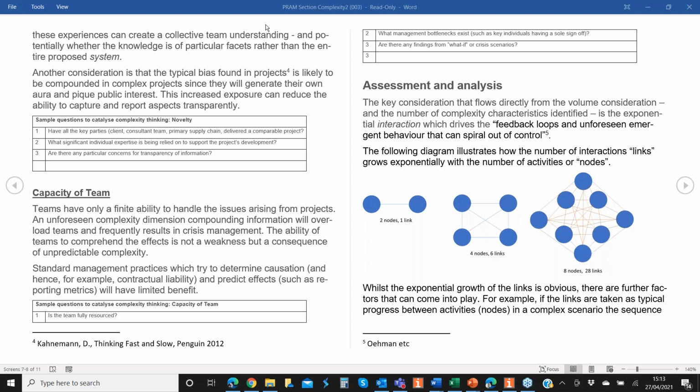Speaking of Australia, I'm connected to you from Australia, and I'm curious, in defining complexity, have you used systems like Dave Snowden's Cynefin approach to look at the difference between complexity and simply complicated? Because it makes quite a difference. In fact, as Jake pointed out, a lot of the issues of complexity almost inevitably arise from people, and the things people do. If you can separate out the parts that are merely complicated, then you can focus on the bits that will cause the project to spiral into complexity and possibly into chaos.